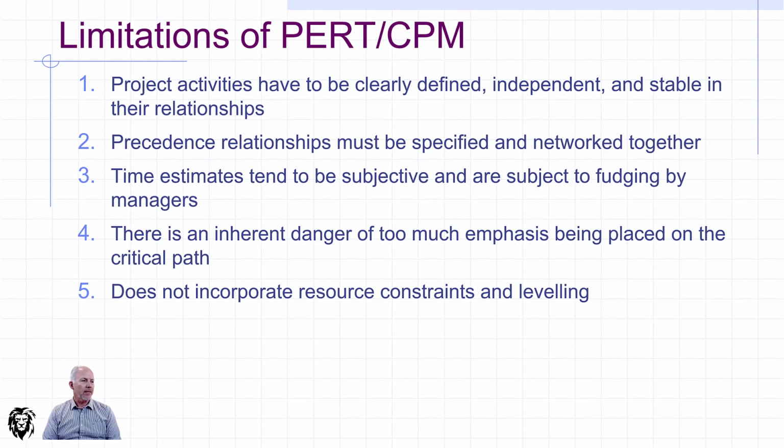So yeah, it is worth pointing out. I certainly emphasize the value of protecting the critical path, but you can't protect the critical path excessively at the expense of your other paths, because as we see, it is the confluence of the probabilities which is going to matter. And if you protect the critical path without paying due attention to the other paths, then you risk it no longer being the critical path, and all of your resources are lined up to protect the wrong path. So don't lose sight of the entire network, but use the information for what it's worth.